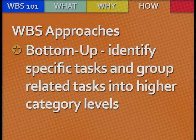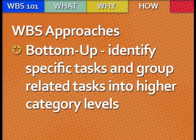The bottom-up approach is quite the contrary to the top-down approach. This method begins by identifying very specific tasks, then organizing them into group-related tasks before categorizing them into higher and higher category levels. This method is very time-consuming, but may be the most effective.